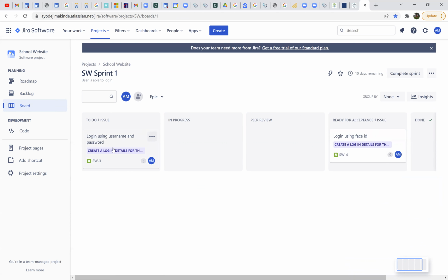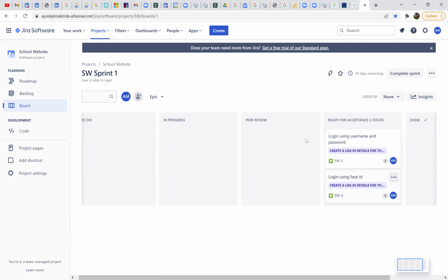So now let's say we've completed this, and the product owner accepts it. And look at this: 10 days we have remaining. It's a 2-week sprint, and it starts today. That's why we have 10 days remaining. But every single day, it is going to go down until the last day, where it goes to 0.